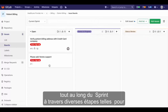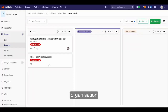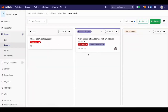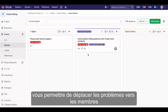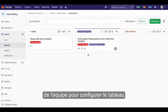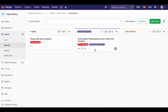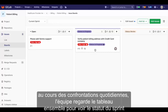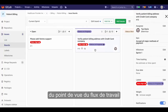Throughout the sprint, issues move through various stages, such as ready for dev, in dev, in QA, in review, and done, depending on the workflow in your particular organization. In GitLab, issue boards allow you to define your stages and enable you to move issues through them. The team can configure the board with respect to the milestone and other relevant attributes. During daily stand-ups, the team looks at the board together to see the status of the sprint from a workflow perspective.